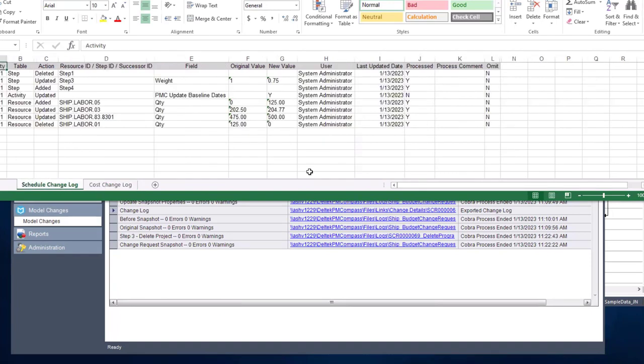And also, Ruth Ann, we had talked about it just as a point of clarification that these changes are only going against as-planned activities in Open Plan, not against in-progress. That's a good point. Correct. Yes, for 8.3, that is correct. We're working on the in-progress bit, but this release is driven by client demand, client need. We're going to have to continue work to get it for in-progress activities. That's coming, I guess, is the short answer.